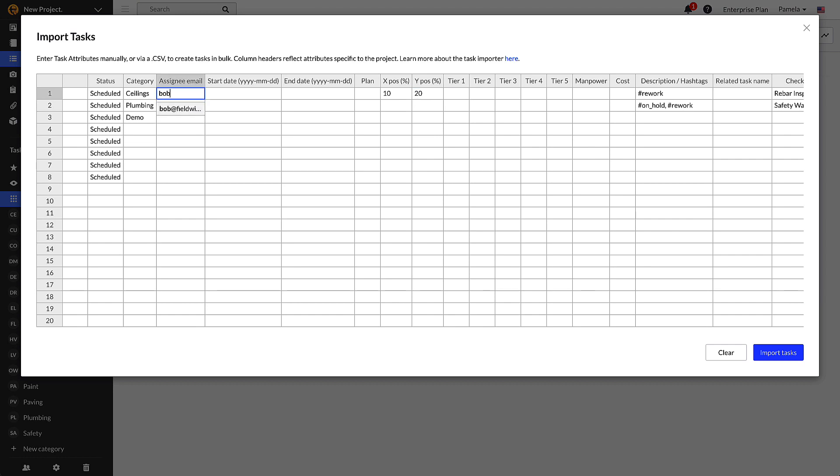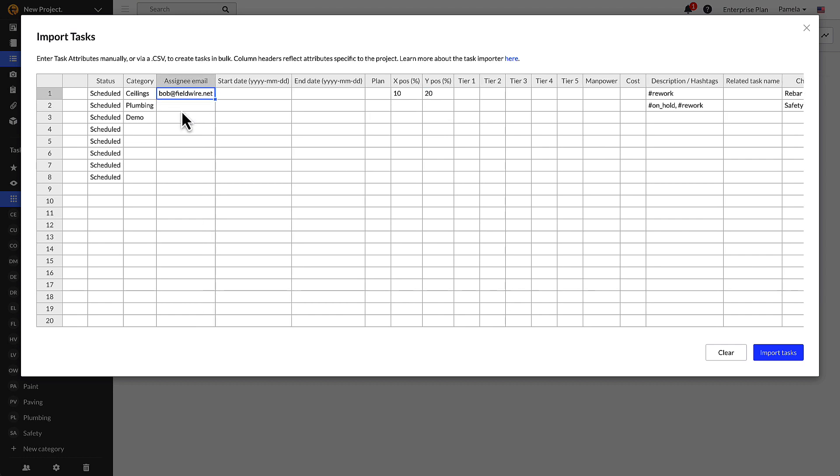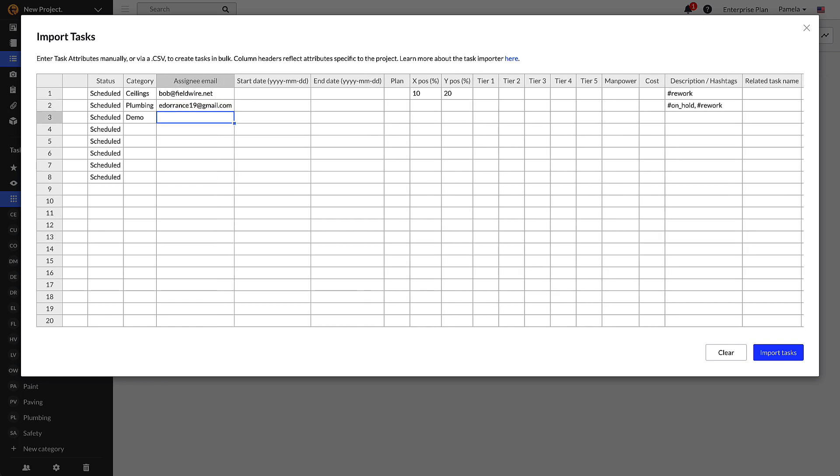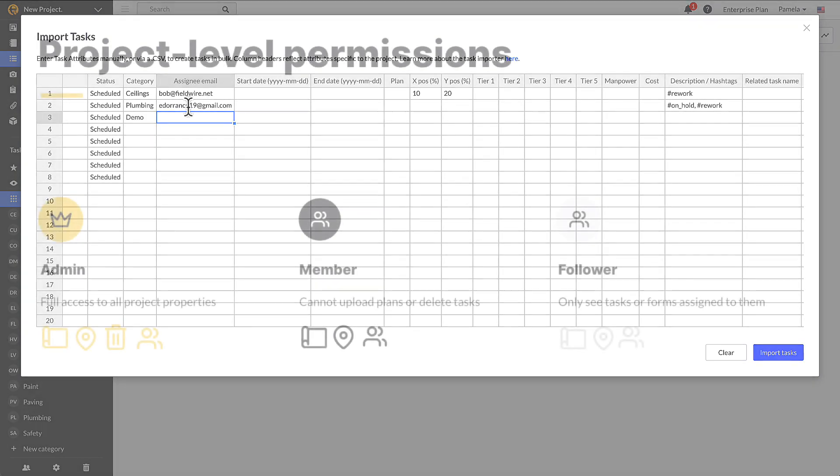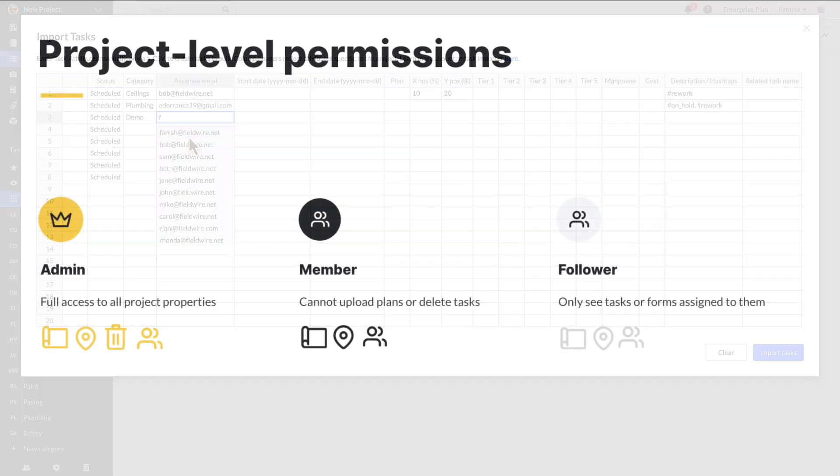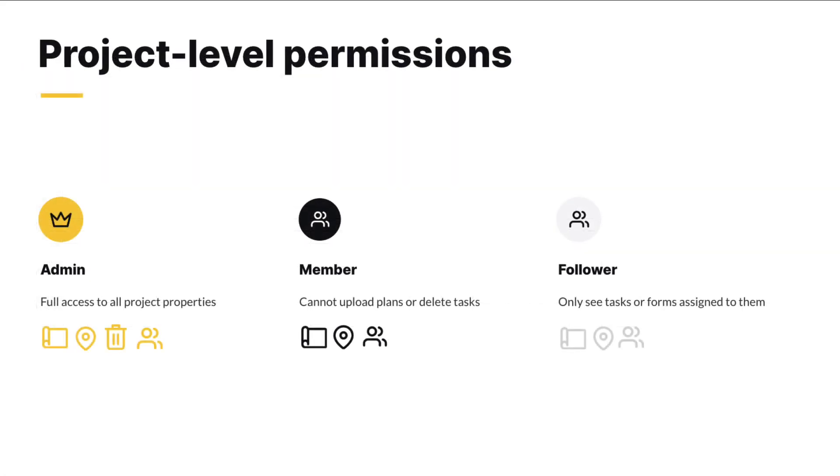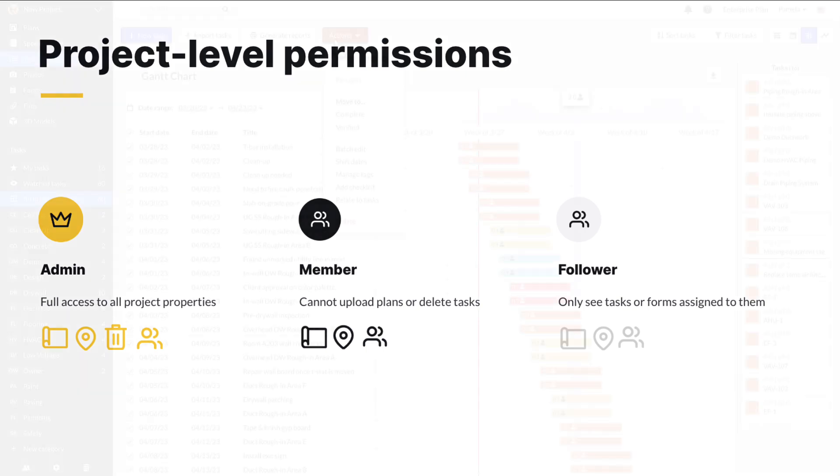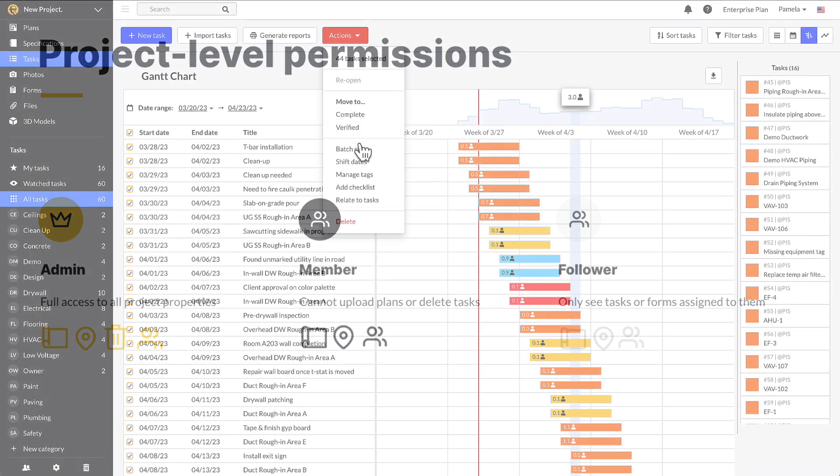You have to add the exact name of the given attribute in order for the task importer to function correctly. For example, if you want to assign a task to a specific individual, you need to ensure the spelling of the email you input matches the spelling of the email of the person on Fieldwire. If the assignee isn't a user on your project, they will receive an invitation and be added to the project as a member into your Fieldwire account as a project user.